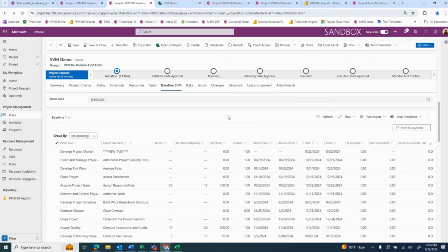So you can have some kind of variance or some kind of calculation that shows this resource was 100% tracked across all projects. Their effort was 100, they logged 100, or they logged 90, so they actually finished their tasks with even less time, versus this resource across all projects had 100 hours and ended up logging 200. Obviously, they needed more across all tasks, and obviously we could also play in cost into that based on the resource's hourly rate and how many additional hours there were, how that cost is now going to affect the bottom line of the project.